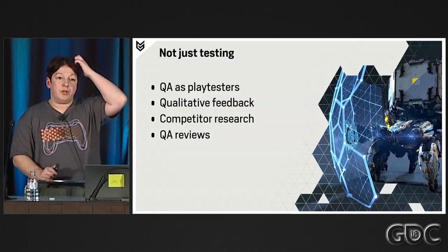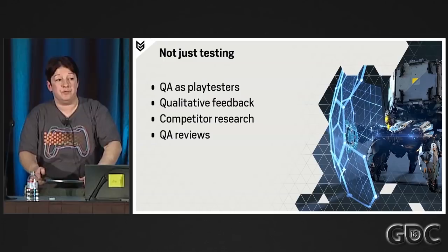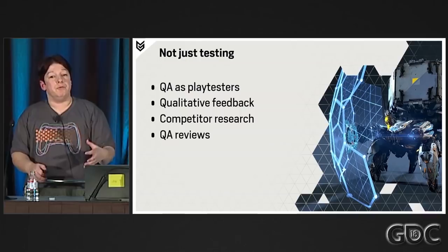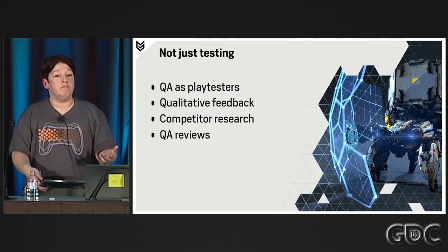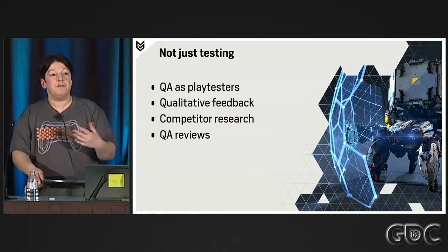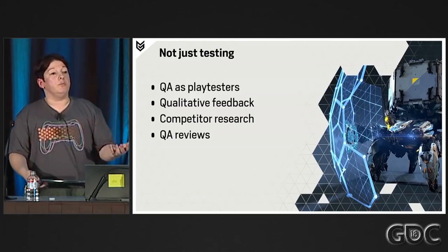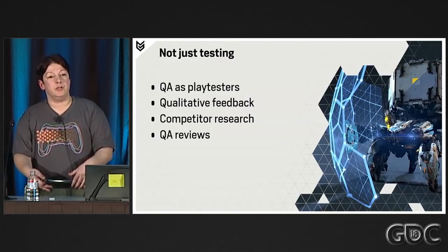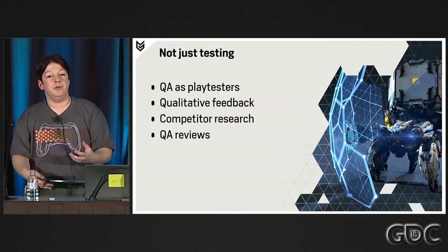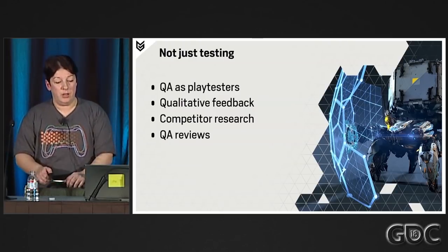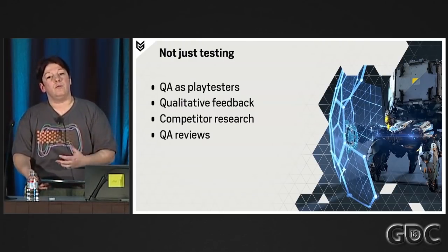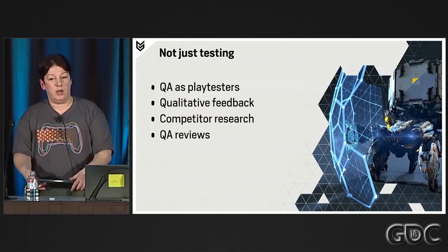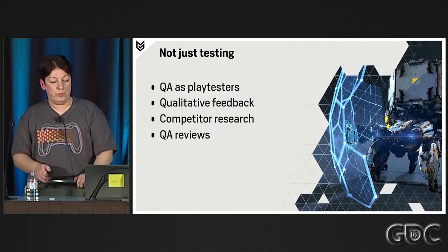We also did QA reviews. This was a technique that was very useful for us, where we got the entire QA team in one room, and for an hour we would play a feature or a piece of content, and everybody would weigh in with their particular point of view. And this is where those experts, those specialized testers, could really bring their contribution and just enrich the conversation. And it also brought awareness of what was happening with other areas of the game that you were not necessarily working on, and just the state of the project as a whole.